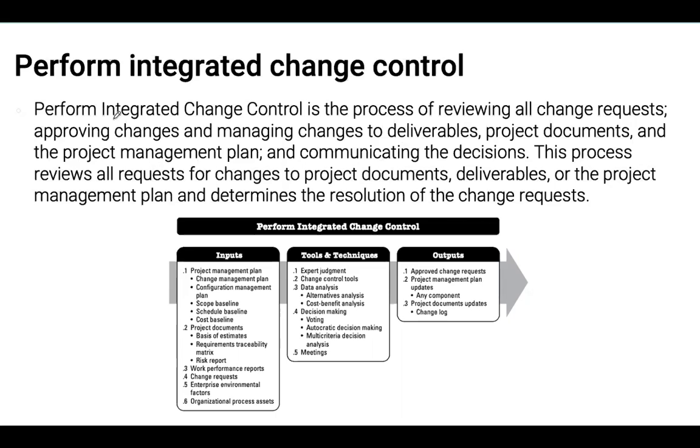So in the integrated change control, all requests for change are reviewed and approved or rejected. And it might be done by something that's called, let's say, CRB for Change Review Board, or there might be other names, Internal Review Board or Process Review Board, or Project Review Board, depending on what the naming convention is. But someone has to be able to review it and approve those changes.